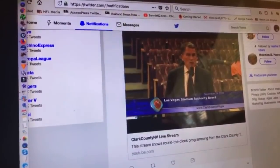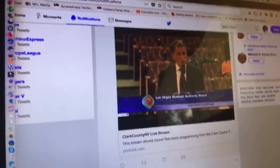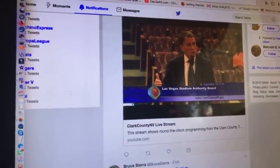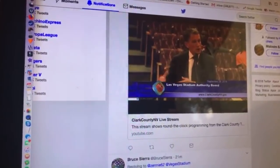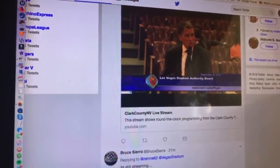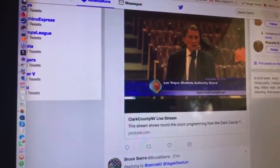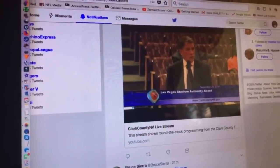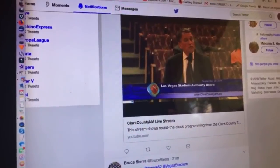And early in a design-build project like this, there are always field changes to the design. It's hard to deal with those on the fly. They take time and money to deal with on the fly, whereas later on in the project, that is less the case because the work is essentially being replicated. So whatever design changes you made in the field early on, you're already aware of those for the next 2 or 3 pours that you do. So I think all of those suggest the schedule is going to be better than what they anticipate, even with the efforts that they've taken to resequence and recover.